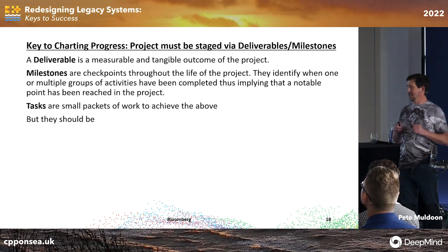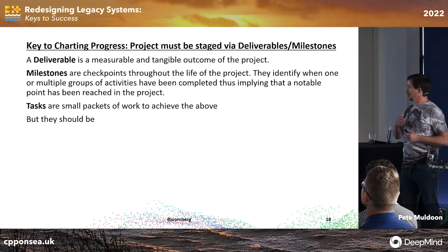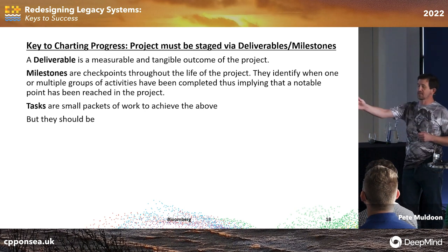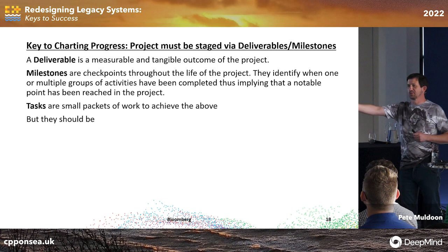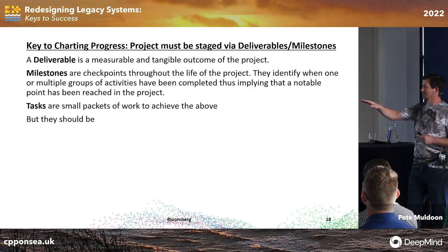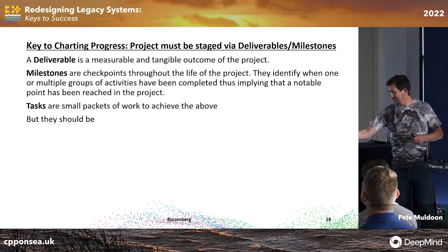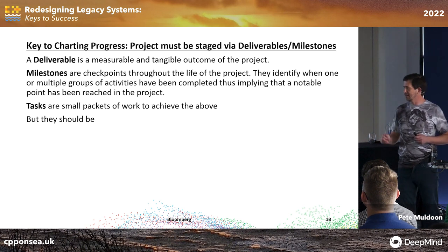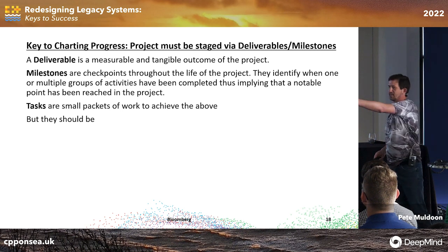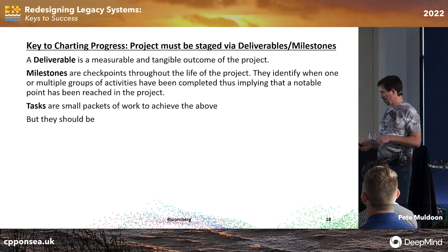So even if you misestimate, if you write down all the deliverables and milestones that you have, and you get the timing wrong, at least you know where you are along the path. It's like you go to climb a mountain. Distances are closer than they appear. That's probably the case when we put in, I'm going to do this, and it's like, man, they were further apart than I thought. But at least if you have those sticks in the sand, you know how far along you are, how many of those you've conquered.